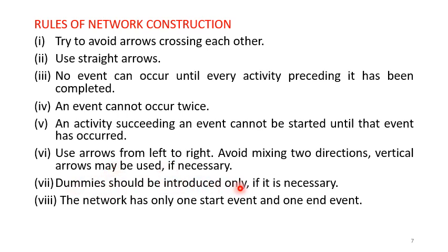Dummies should be introduced only if it is necessary. All problems may not require dummies. And finally, the network has only one start event and one end event. So the entire project or network will have one start event and one end event, the initial event and the last event.